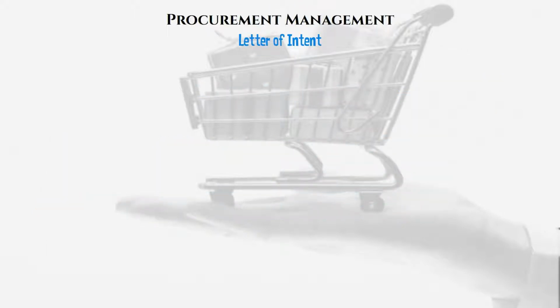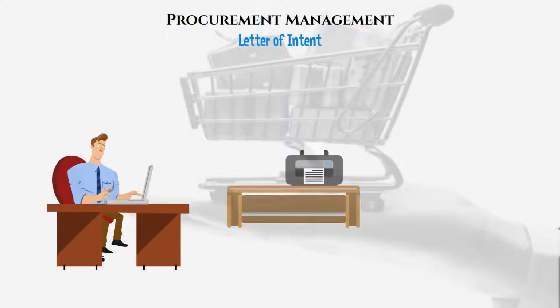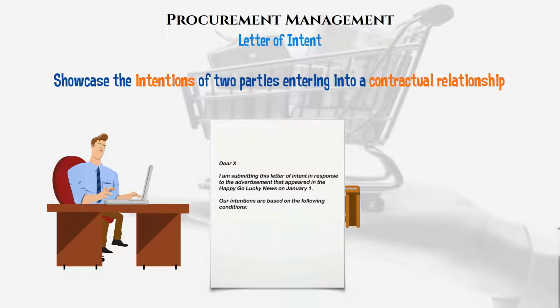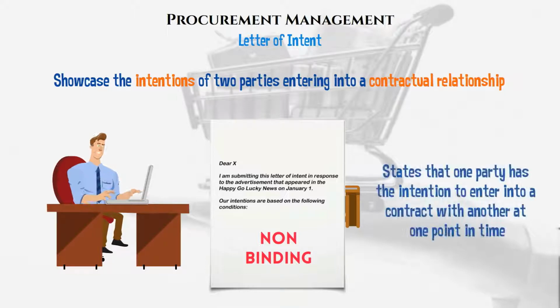Letter of intent. Letters of intent are used to showcase the intentions of 2 parties entering into a contractual relationship. A letter of intent is non-binding. It simply states that one party has the intention to enter into a contract with another at one point in time.